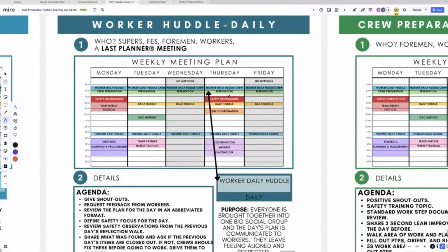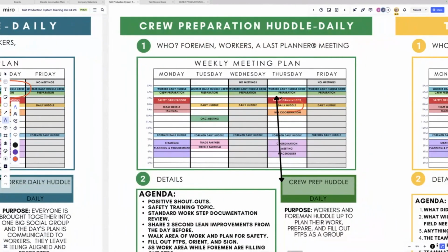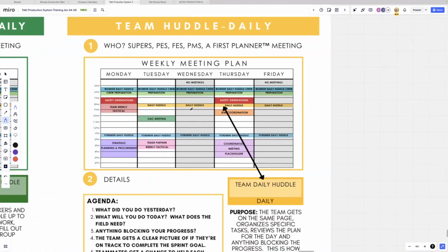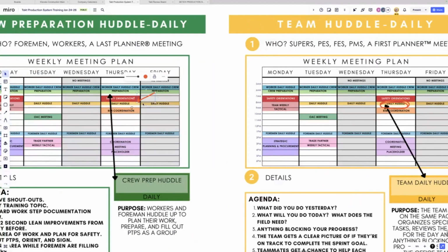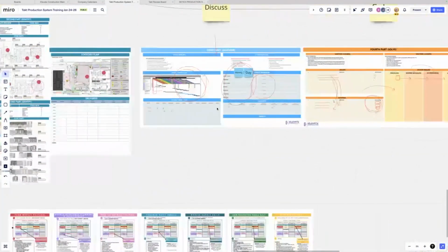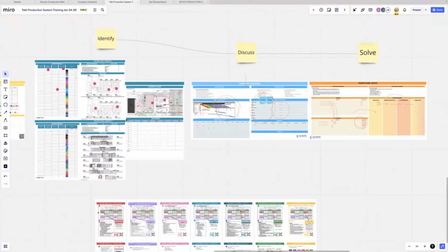You can, with your day plan, then communicate the plan to the workers, and any major issues will go to the project team as a part of their daily huddle with the project manager and the project engineer. These are for the issues that the foreman and the superintendents cannot control and cannot get rid of, right? That's in the, actually it's on this one, it's on the daily huddle, okay? It shouldn't have been on this board over here. So the cadence here is, if I zoom out from the meeting boards, if we know our problems, we can then create our weekly and daily plan and solve problems together. And if it ever gets too much for the foreman and the superintendents, defer that to the team.